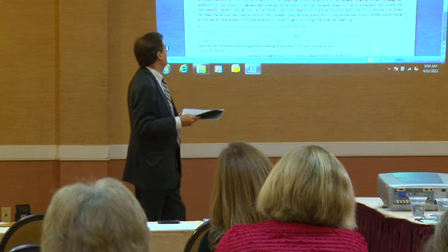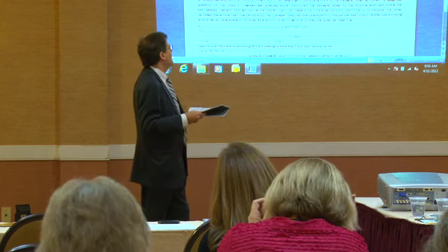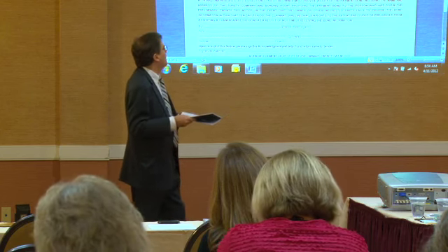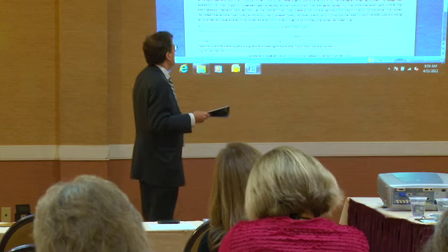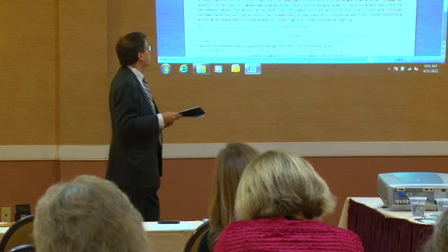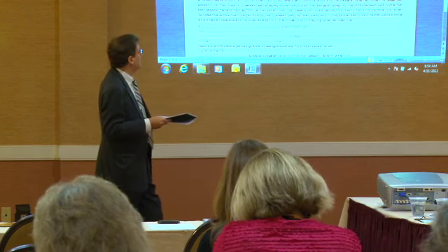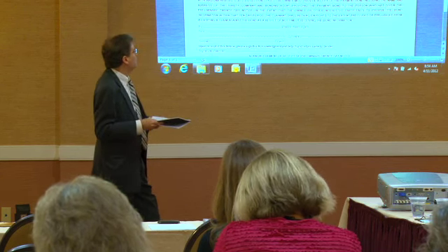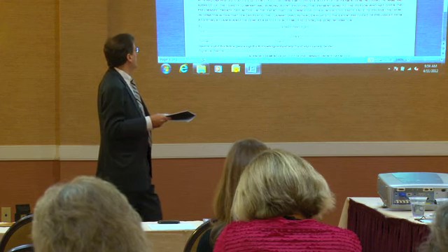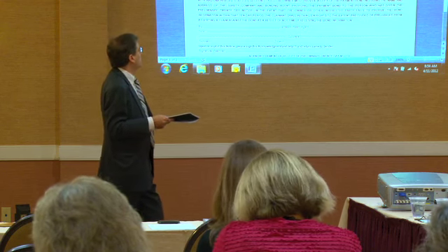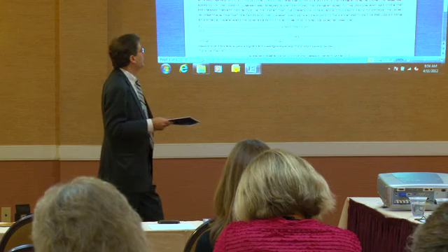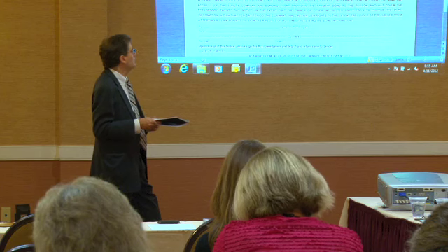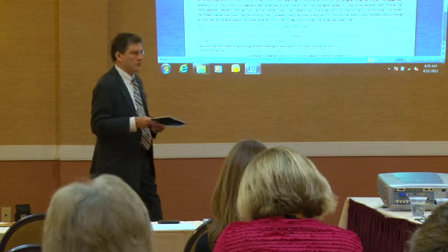Within 10 days of the receipt of this preliminary 20-day notice, if any payment bond was recorded in compliance with ARS 33-1003, the owner has to provide a copy of the payment bond, including the name and address of the surety company and bonding agent providing the payment bond, to the person who has given the preliminary 20-day notice. In the event that the owner or other interested party fails to provide the bond information within that 10-day period, the claimant shall retain lien rights to the extent precluded or prejudiced from asserting a claim against the bond as a result of not timely receiving the bond information.